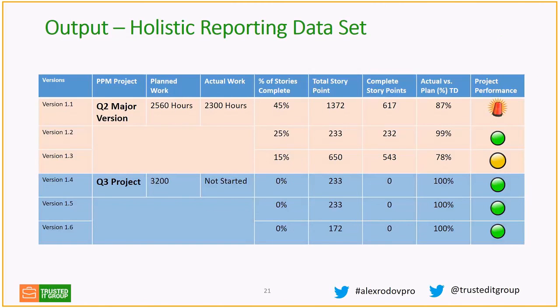If we're halfway there, and we're assuming that these stories are evenly distributed on the timeline, then every day we should be completing the same amount of story points. Which in real life may not be the case. You may have a soft start, maybe accelerated development, and then winding down the development.